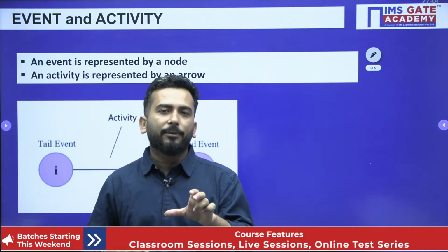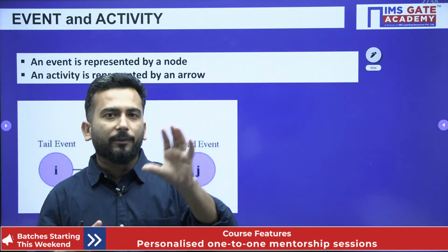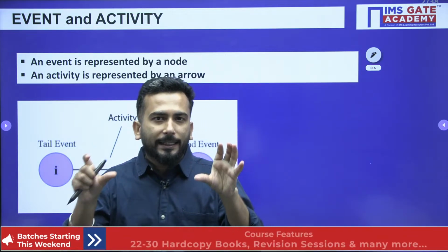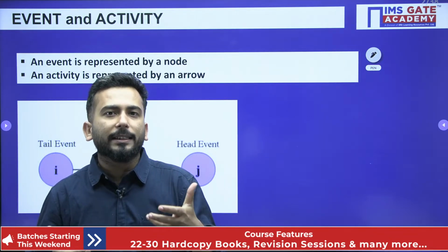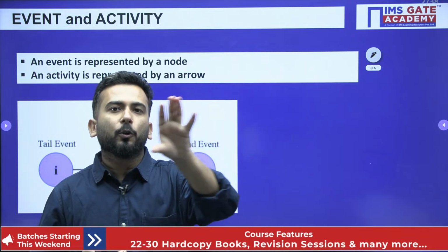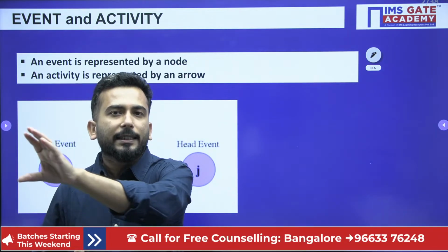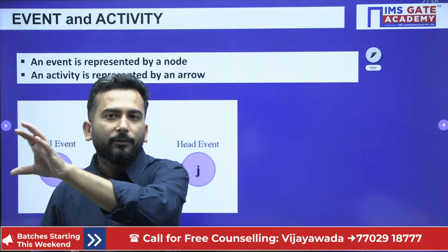So my dear friends, if I'm representing IPL as a project, an entire project, that is made up of events and activities. Now what can I say as an event? IPL is starting, or group stages are starting, group stages are ending, semi-finals are starting, semi-finals are ending, or qualifiers, whatever you say, final starting, final ending.